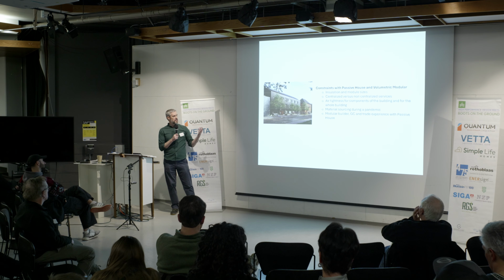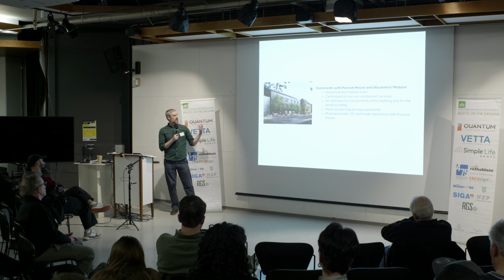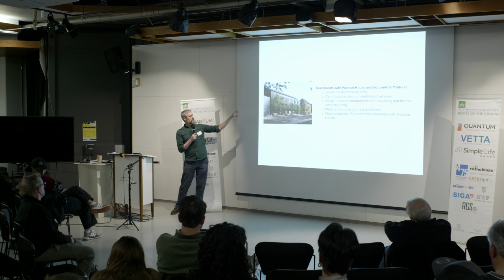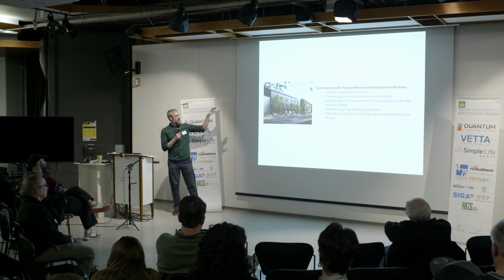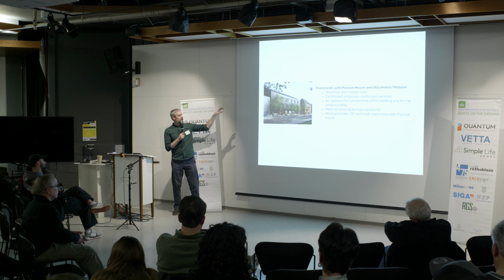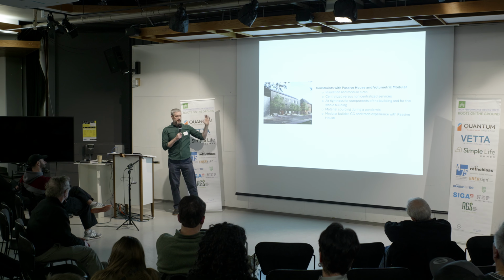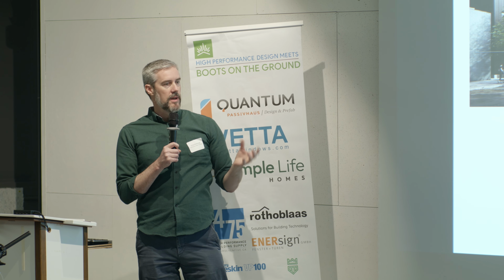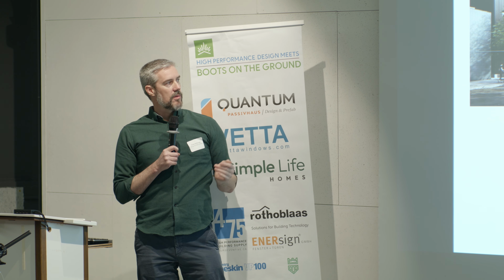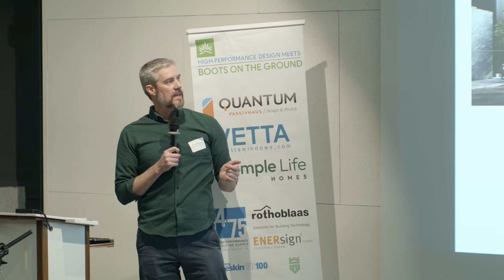And so we had a lot of gymnastics around how to make reductions there. We ultimately ended up with just one 14-foot module, which was the stair and elevator and mechanical room module, and all the rest we were able to condense the width down, so they didn't require that police escort.